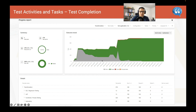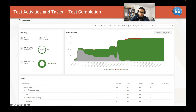Throughout the course you can see that some tests did not run from the beginning, then as you progress there were some bugs, but then the bugs got closed, retested, and passed. Some tests became not applicable toward the end. The test plan also shows the number of tests from each particular phase: end-to-end 13, UAT 13, functional process test 326, exploratory 226 tests. This can help support the completion of testing by producing a progress report.